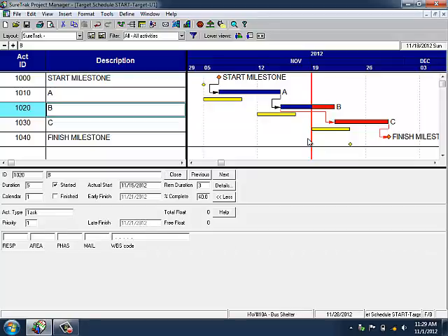Let me tell you how a real client used this on a $95 million job. In the summer of 06 and 07, the project that Dr. Jarrett and I worked with Iowa DOT to write that 3-page scheduling spec, there were 2 SureTrak schedules on the entire I-235 from downtown Des Moines. There was one from the river bridge on the Des Moines River west and one from the bridge east. 2 schedulers, one my past student, one graduated before I got here. 2 independent SureTrak schedules, all show target bars, and it was all done using CPM logic because linear scheduling wouldn't work. There was too much complex logic to use linear scheduling.